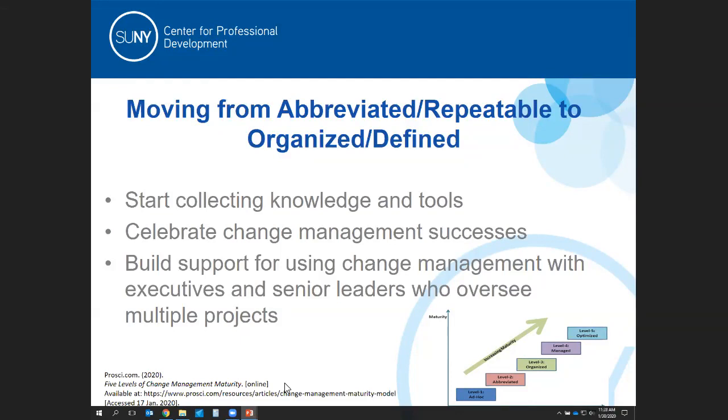So we keep in touch with each other about the projects using Teams, but we also have a way to post the general overall work of the project on a ServiceNow platform where anybody who's working on the project can visit the project site and learn about the status of the project, the tasks that are completed, the tasks that are coming up, and the amount of time we expect it to take. We have an issues log. Projects are experiencing issues. There's one place to go to learn what they are and how we are recommending they be solved.